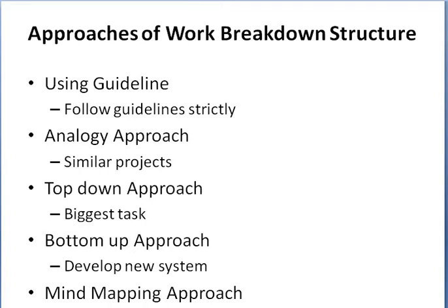Means in short, the whole project is divided into small tasks, and it requires more logic and structure for creating this work breakdown structure. So this approach will identify the solution first and then dissect the solution into smaller steps which are required to implement it. Then one more approach that we have is bottom-up approach.